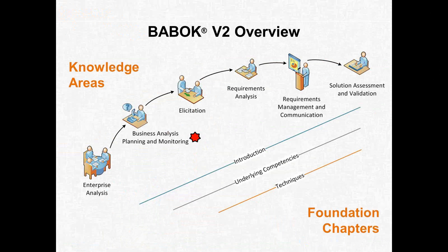Enterprise analysis basically starts with the needs, problems and opportunities, which are translated into proposals, and these proposals are transformed into a business case. This business case is presented to the top management. The top management reviews it, and if it finds business value, the management approves: let us do this project. So when management approves the business case, a project is born.